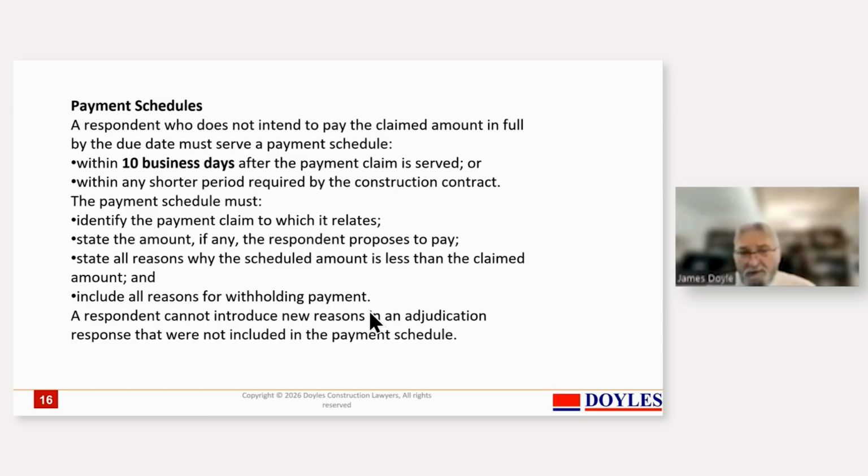And having got it back within that time, you're fundamentally going to be restricted to the reasons you raise. Firstly, as a matter of common sense, because the adjudicator is going to regard later reasons as drummed up reasons, as less credible than something that you put down in there. The other aspect, though, is you must get some reasons into the process if you don't intend to pay.